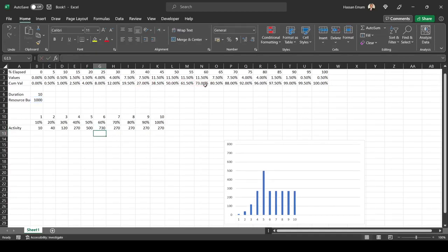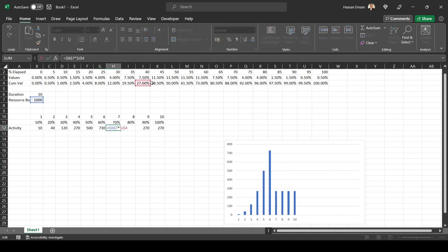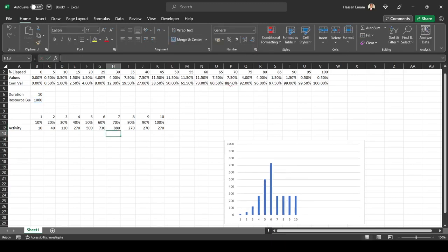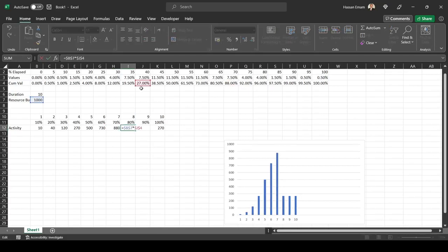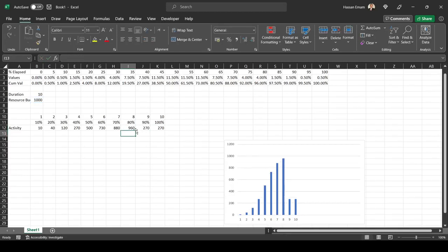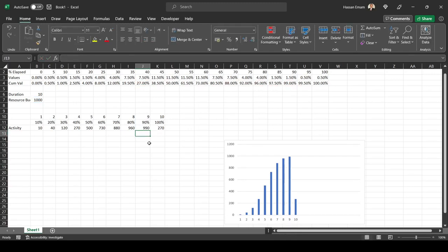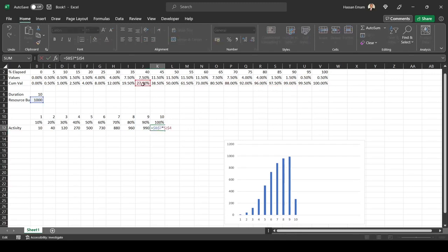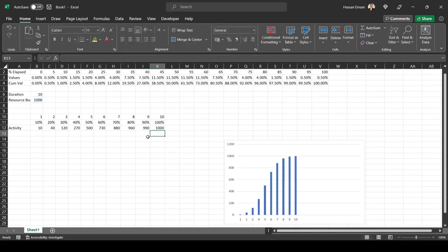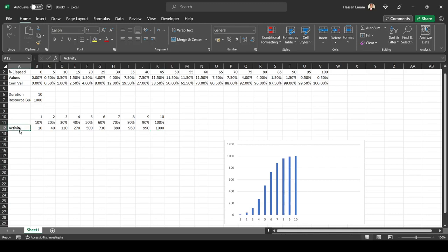When we finish this, you will find the curve or the graph that would be generated would match exactly what we have in P6. There are more into that, like special cases when you have something falling in between the values, and you basically do that by proportion. You need to calculate what is the proportion between the two values and then put it in between.